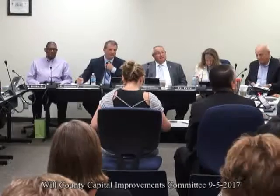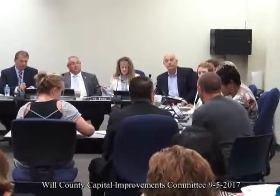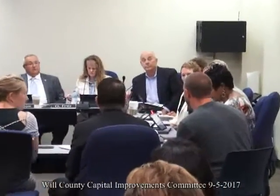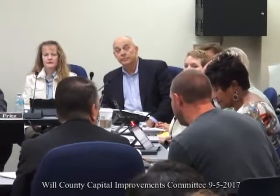Just to piggyback on Nicole's update, we did complete our commissioning of Area A on Friday, 9-1. We do have some outstanding items that we provided a final snapshot of where we stood on Friday, and those items were included in the substantial completion letter for Area A. So we're working with Leopardo and Joel to address those items in a timely manner, and we'll continue to work on that the next couple weeks.